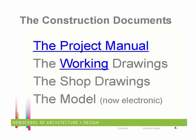Well, the methodology that had been agreed on was they would only drop one panel of forms, slide them out, and get the laborers in there and put in the other shoring. It's just jacks and posts that hold it up. And they would do that a panel at a time. The foreman who was there that day didn't know it, and he went through and dropped all of the half of the 270 feet, 135 feet of forms.